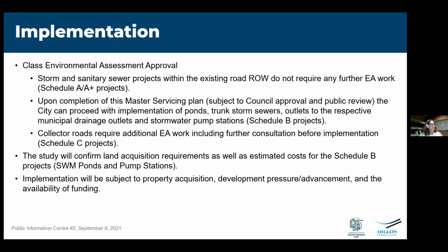Collector roads require additional EA work, including further consultation before implementation. The study will confirm land acquisition requirements as well as estimated costs for the Schedule B projects. For the stormwater management ponds and pump station, it should be noted that cost estimates for road networks, sanitary improvements, as well as other services will also be completed as part of this assessment. So implementation will be subject to property acquisition, development pressure and advancement, and availability of funding for these projects.